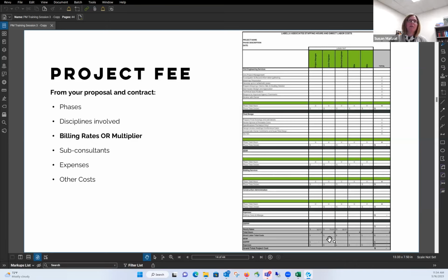And I like to bring up here, hopefully no architects get mad at me for this, that in some of the architectural led projects, it's: this discipline has this amount of fee for this phase of work. But then it may be up to a discipline lead to say, okay, this is how that fee gets broken down by my senior mechanical engineer, my junior mechanical engineer, my technician.